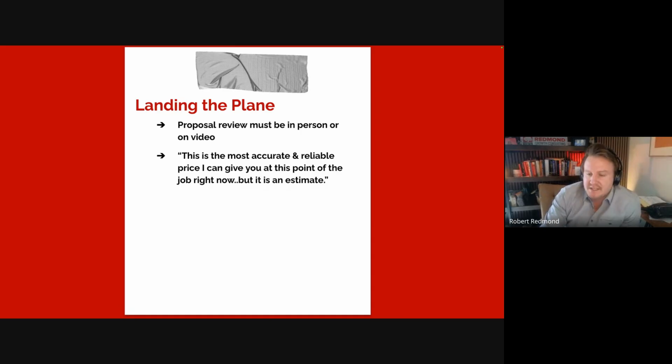Remind them what an estimate actually is on that proposal review call. So what is an estimate? When you're giving that first proposal, you're literally telling them this: as a cost plus contractor, I still very much care about finding out how much this is going to cost, so that we can make sure this is within the scope. This estimate is the most accurate and reliable price I can give you at this point of the job. Based on everything I know about the job right now, this is the most accurate price, but it is an estimate. Meaning that things change when the project starts.